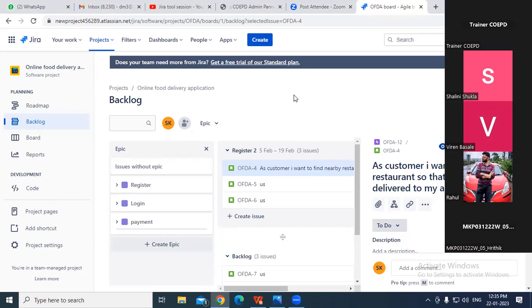But don't put it after back testing. There will be UAT, right? The demo, which the BA will give to the stakeholders. Once the stakeholders give the approval for that demo, then we need to release that feature to the live environment. That is, we put it to the server, no, Rahul? Send it to the server, no? Okay.